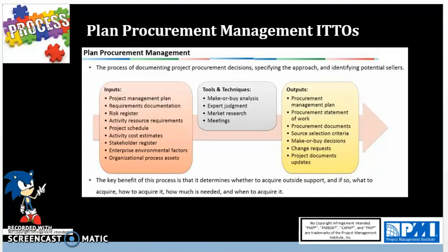So, for example, if the software being procured is going to be used for more than the break-even period, it is wise to make in-house. But if the external software is going to be used less than the break-even period, then it is best to buy from the market and is more cost efficient.